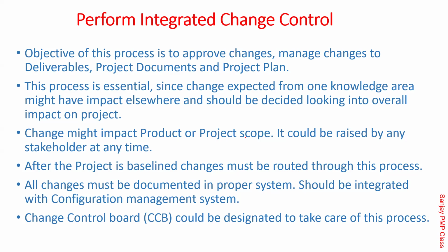Kuldeep, that is at least fine, still it is a deliverable, because you need to present it in a proper way to the guest. But for doing that, you need to go to the market and bring the fresh vegetables. It's project work. It came into scope. You have to take it in scope, Kuldeep, because it will cost money, it will take time, it will need resources. If you forget that part of it, your costing will go wrong, your planning will go wrong. Is that making sense?